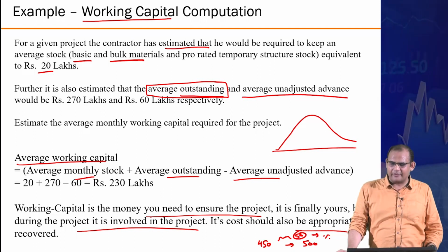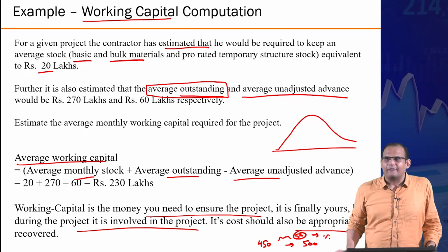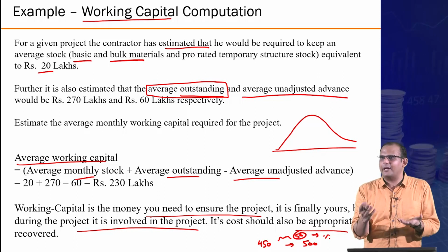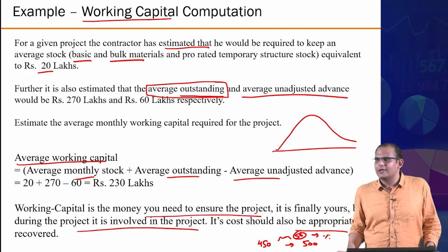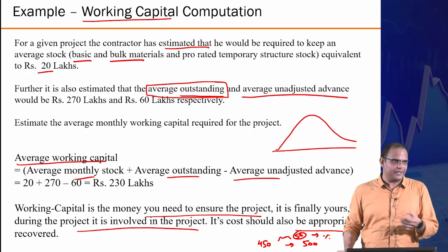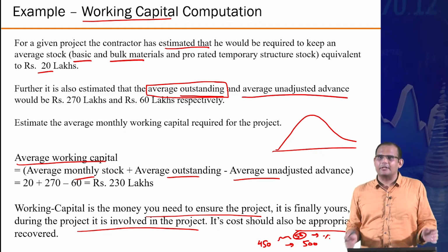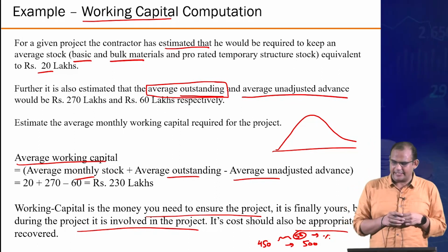And I gave an example: if the annual turnover of a company was just 1 crore, for 1,000 crore projects you might expect that at some point you may have to have working capital of some 100 crores. So if your total revenue last year was 1 crore, how are you expected to raise 100 crore to fill that requirement even temporarily, right? That's the kind of judgment clients also make for this kind of contract selection.